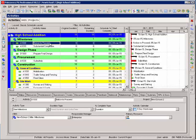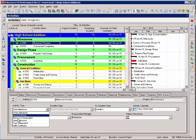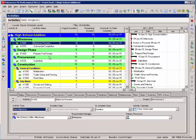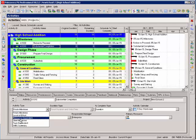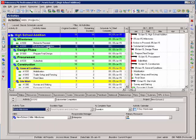Now that your activities are entered, let's look at some features for the activities that you've entered. Make the notice to proceed a start milestone. These are milestone activities so we want to set substantial completion as a finish milestone. The rest of these activities will be task dependent.